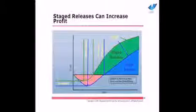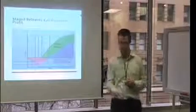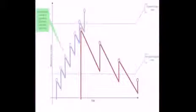So what we try to do is to reduce this curve to actually deliver something as quickly as we can to our client, to our user. Because what that will do, it will offset the additional expenditure on the project. So it actually can become self-funding. The money earned through an early release is going to offset the additional development, or at least reduce it. Now, we can actually save our CapEx costs up front because you won't need as much money up front. But the other thing we can do, which is quite successful, is that we can appreciate a project over depreciating a project.